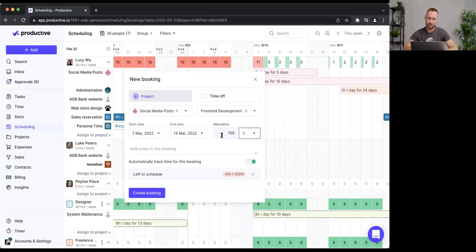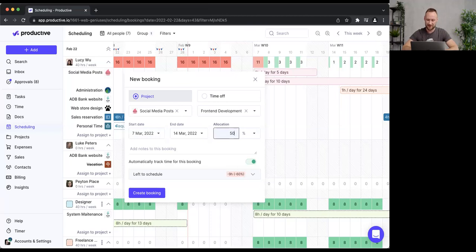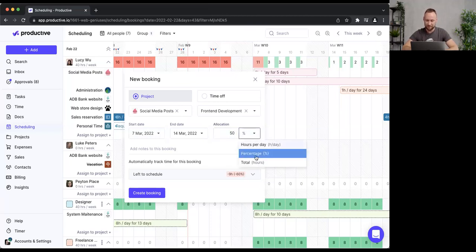If Lucy's capacity is eight hours per day and I set 50%, that translates to four hours per day. Then there's total hours — a great method if you're not sure how many hours to allocate per day but know the total pool of hours you need to assign for this time frame.